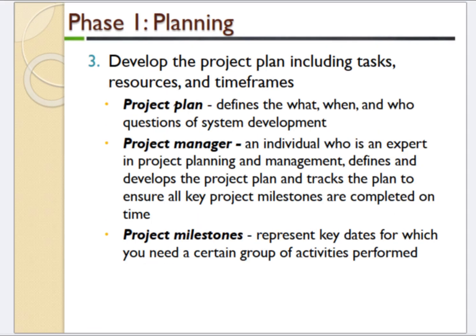3. Phase 1. Planning. Develop the project plan including tasks, resources, and time frames. Project plan defines the what, when, and who questions of system development. Project manager, an individual who is an expert in project planning and management, defines and develops the project plan and tracks the plan to ensure all key project milestones are completed on time. Project milestones represent key dates for which you need a certain group of activities performed.